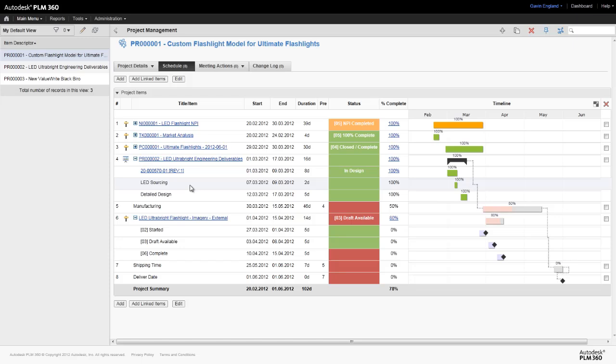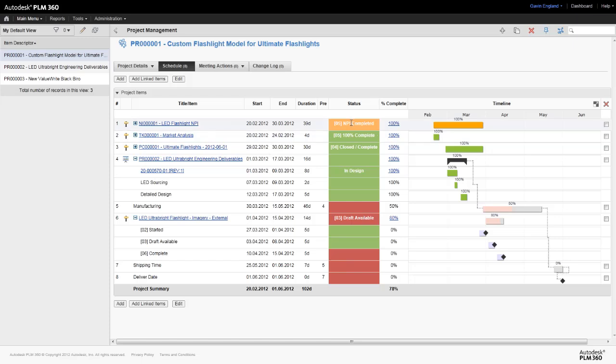For each stage of the project, and each individual subtask and milestone, we are given details of the start and end dates for that item, as well as colour coding for each. Green where we are on target, amber where we are close to our target date and red where we are late.